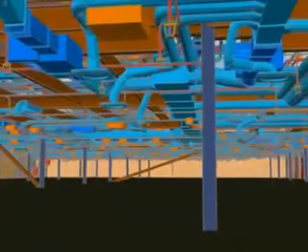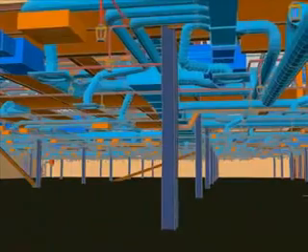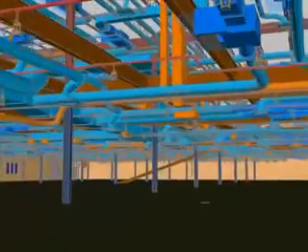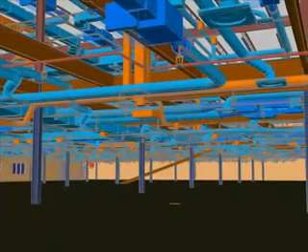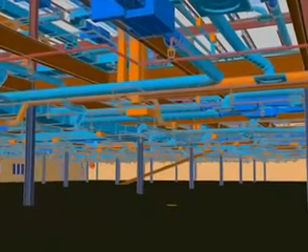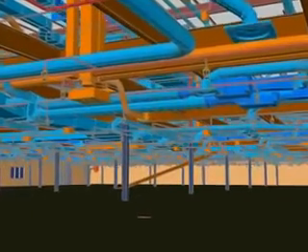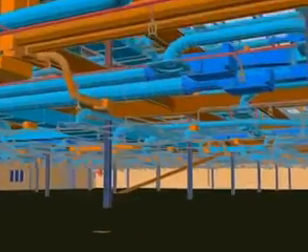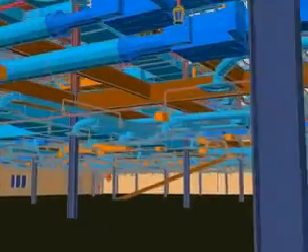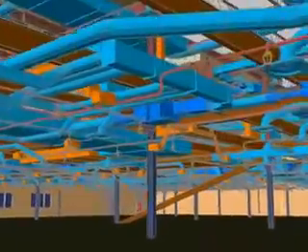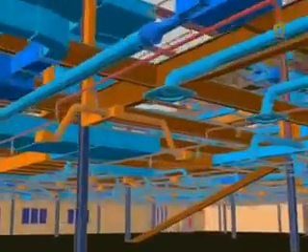Frequently today, project specifications call for coordinating drawings produced by the mechanical contractor prior to placement of fire sprinkler systems, ductwork, chilled and condenser water piping, and electrical distribution systems. This module's universal collision test will show crossing point collisions between trades. When coordination drawings bring to surface any problems discovered during the planning stage, the design team will often issue a design revision, which generally will result in a change order due to the redesign.